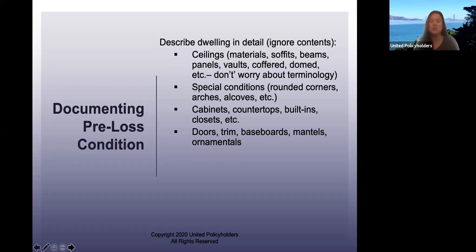What kind of trim? Some doors are hollow core doors made out of metal. Some are solid wood, some beautiful oak. Sometimes they're very thick. Mine are all frosted glass. So that's a perfect example of how everybody's house is different. The only way an adjuster would know that the doors inside my house have frosted glass would be if I told them. Things like that cost differently than different things, and a lot of times they assume standard things.